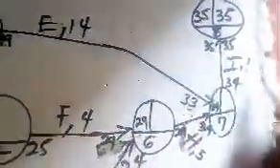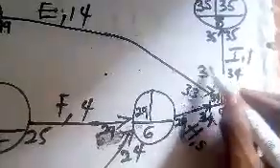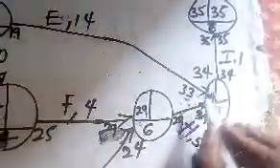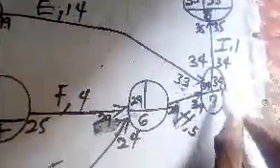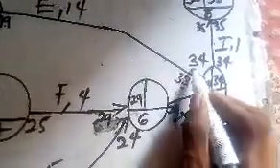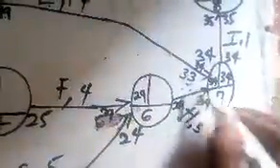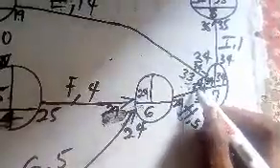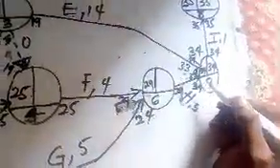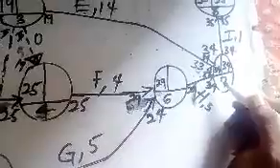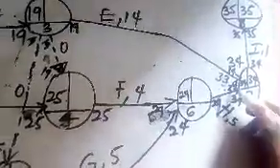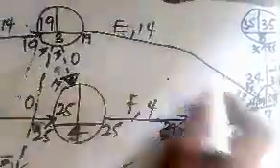So let's consider that coming out with my 35, that will be 35 minus 1, 34. So 34 is here. My 34 will enter here. 34 will come out on top of this activity of E and activity H, 34. So this is 34 here. You need to put this into writing. I guess you understand that. So 34 will come out here to this same node. Let's continue with this node.